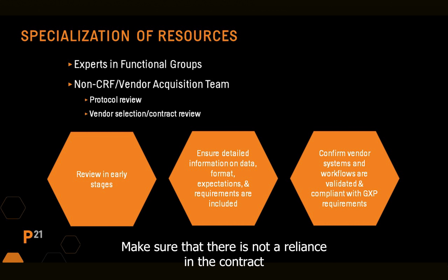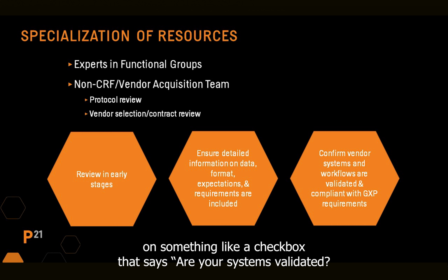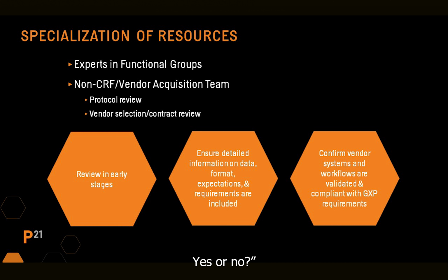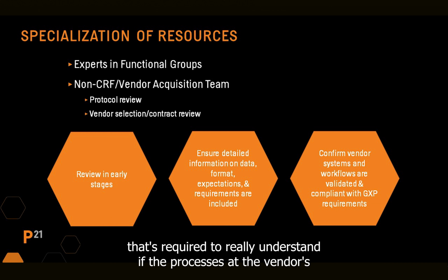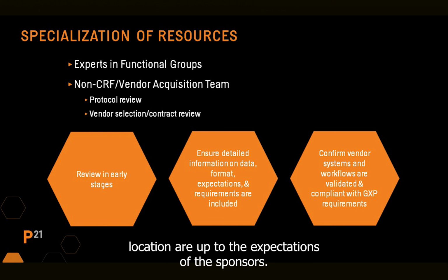Make sure that there is not a reliance in the contract on something like a checkbox that says, are your systems validated, yes or no? Have a deep dive and understand exactly what that validated process is. Typically, the teams in procurement that are managing these contracts don't have the type of experience that's required to really understand if the processes at the vendor's location are up to the expectations of the sponsors.